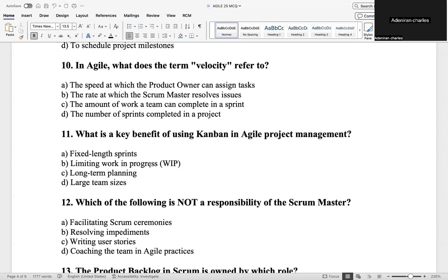Yes, it's clear. Work together, so that even if I finish my own fast enough, I will still join you to finish yours. I won't go back to the backlog to pick until we finish those 4 stories we picked. Limiting work in progress is a major advantage in Kanban because it enhances focus for the team, and helps the team work collaboratively to ensure everything is done well.